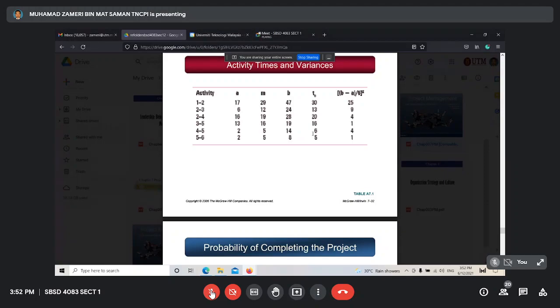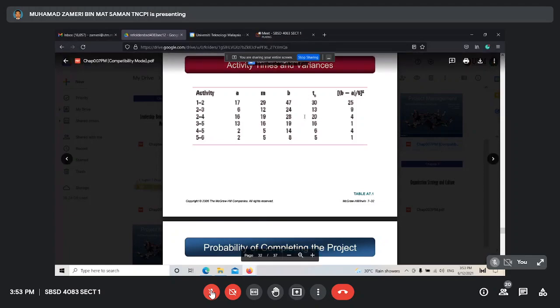The first row has the early start, in the middle the identification, and on the right the early finish. In the middle row, on the left we have the slack time, and then the identification. For the bottom row, on the left we have the late start, on the right the late finish, and in the middle the duration. For duration we need to put TE, because TE represents A, M, and B.